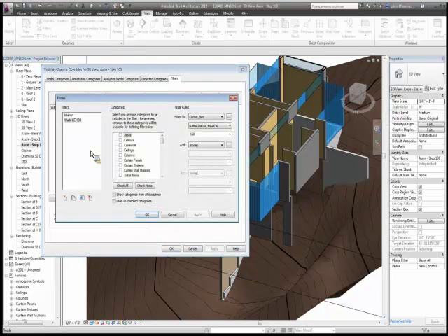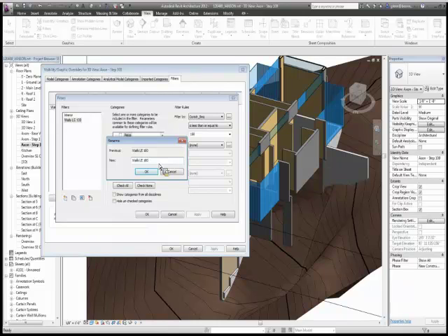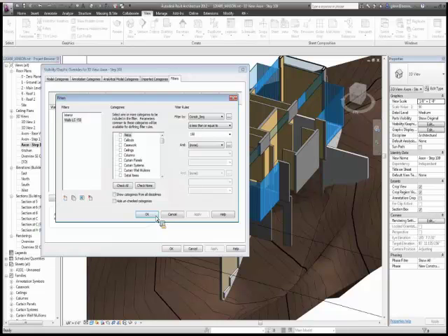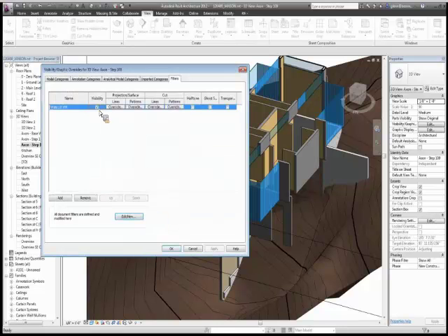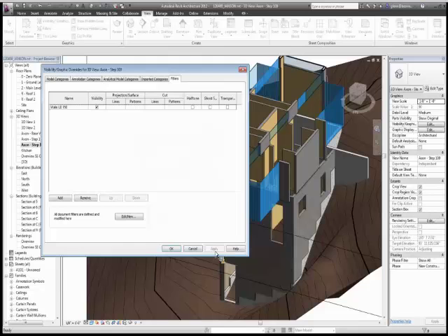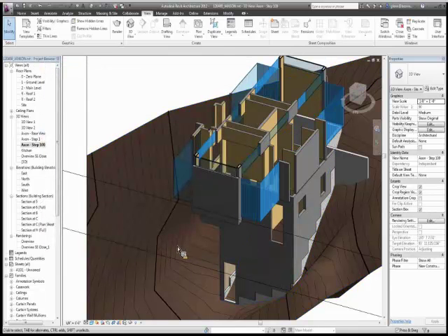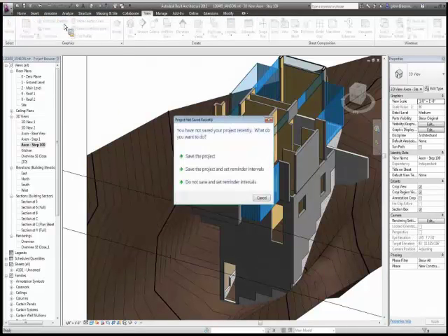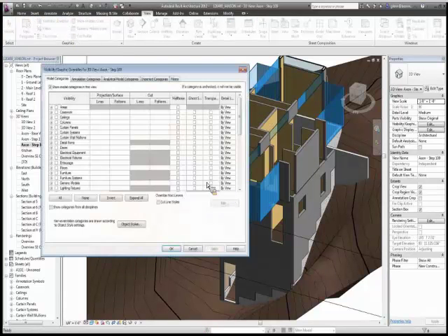Let me rename that because that's going to confuse me. Okay, so again, I can start to control the visibility or invisibility of things based upon the numbers that are assigned. Now, when I do this, what I tend to do is go in the opposite direction. I'll hide things that are greater than a number. That says hide everything that's downstream.